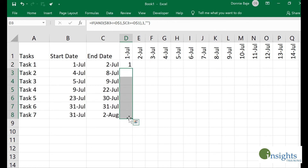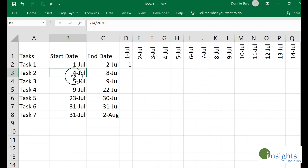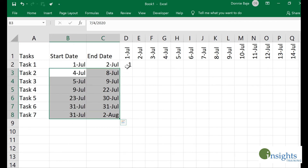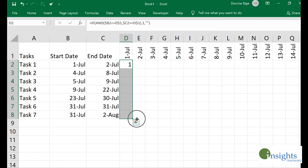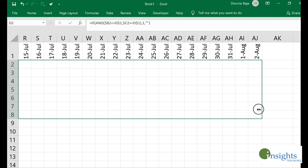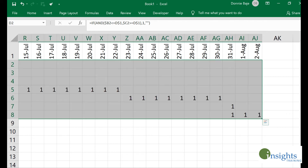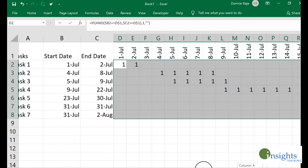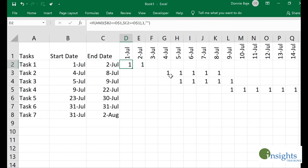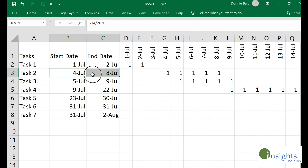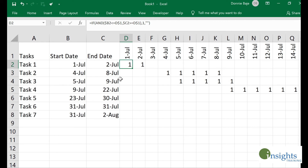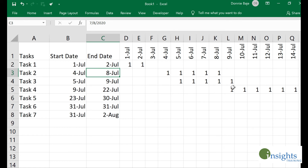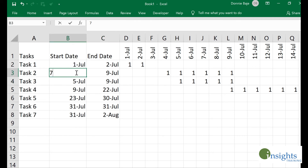Now I'm ready to drag the formula downwards and across. As you can see, nothing happened for July 1st because those dates aren't included in that range. I'll drag it all the way to my last column, and as you can see, the formula managed to put a number 1 on the cells that are included between the start and end date. The good thing is that if we change the duration — for example, changing a date to July 9th — the values actually update automatically.